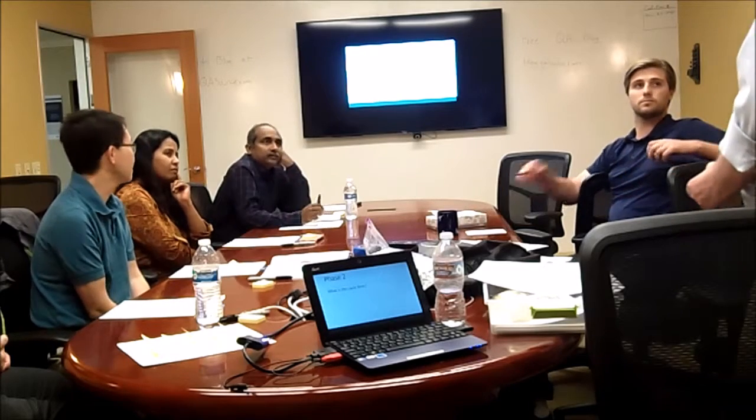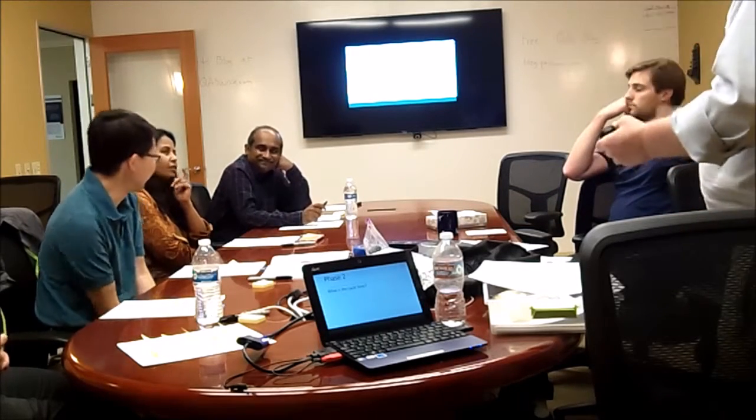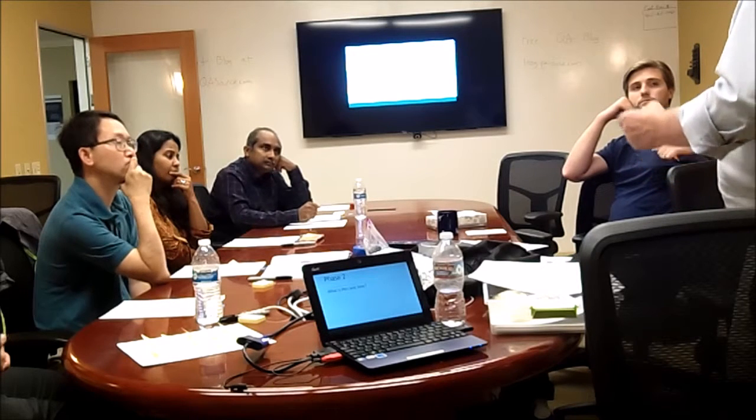It could be a real mess, and it's especially a mess when you have physical inventory, because it physically piles up all over the place, and it can be awful. So unless you change something, like everybody stops work and lets him clear out his backlog, or do what we did, throttle it back and distribute that time over the whole run of the project, then it's a bad situation to be in. That's a red flag. You see work piling up, and you see that the system is geared to let it keep piling up, just yell, stop the line. This is wrong, and it's going to cost us money. Anyway.